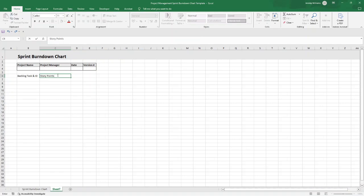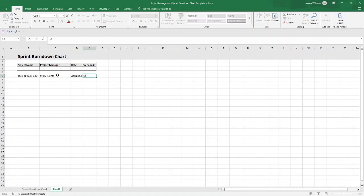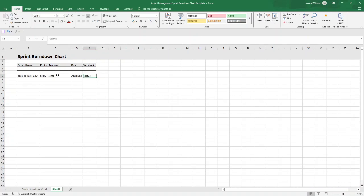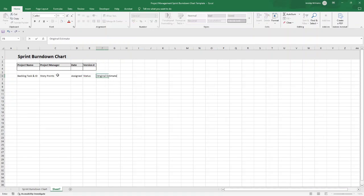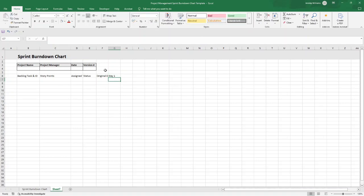We want somewhere to track the story points, which will help to indicate the complexity and effort estimation for each user story. We're going to want to have the ability to assign to different individuals for responsibility purposes. We're going to want status, and I'll show you how to set it up as a dropdown. We want an original estimate, so essentially the initial estimation of effort in hours or points required for each task.